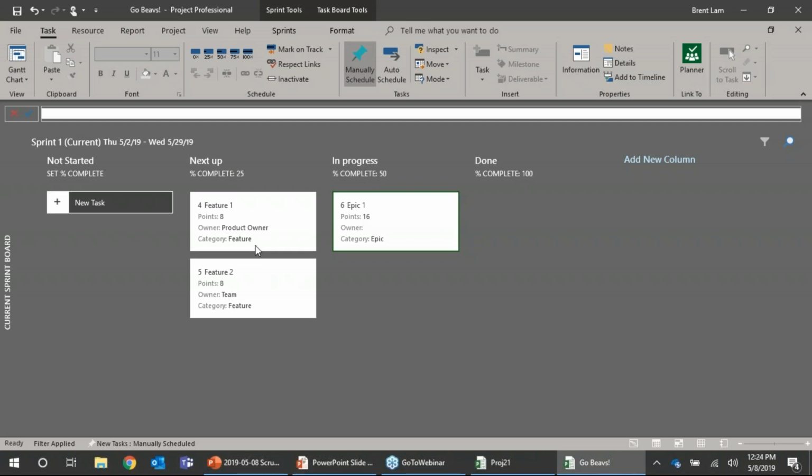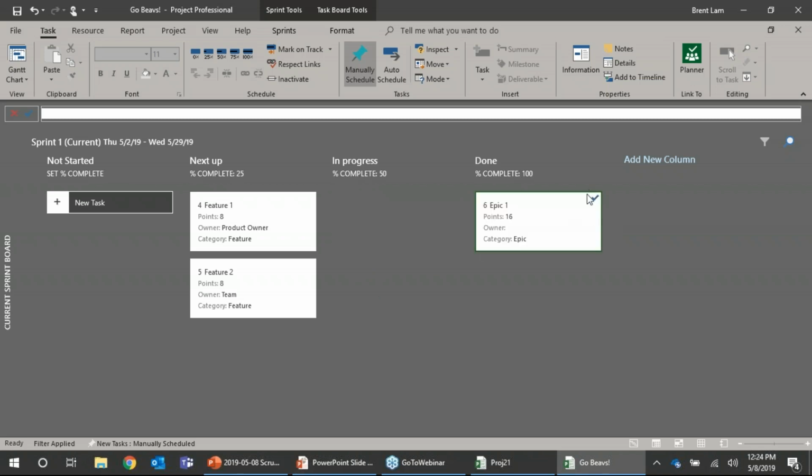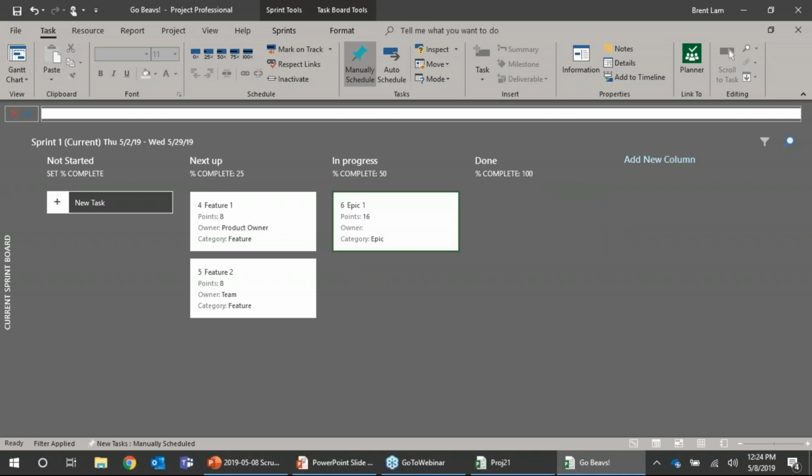In some respects, this is really helpful that as you move these cards and it sets just a standard default percent complete, when you go doing your reporting, it gives you a really nice view into what percentage of that sprint you're going through. So it's just something else to play with and think about. I'm not going to get into too much detail. If I move this card back to 100% complete and the check mark's there showing, and now if I move it back, the check mark disappears because we have automatically assigned it that 50% complete.